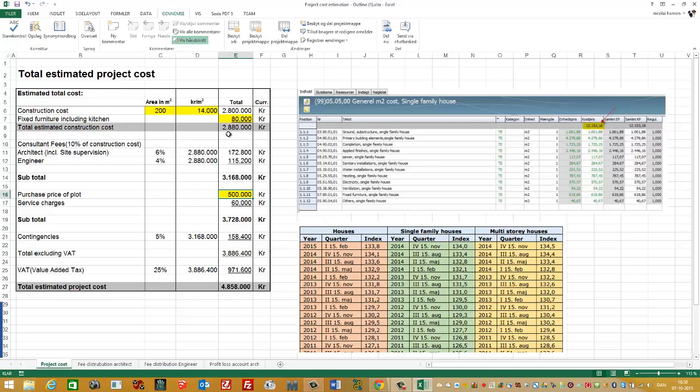Then we need to pay the architect and the engineer. We name it consultant fees, and that is 10% of the construction cost. And then it's distributed to 6% to the architect and 4% to the engineer. So in total, the subtotal is now the total estimated construction cost plus the consultant fees, giving me 3.168 million Kroner.